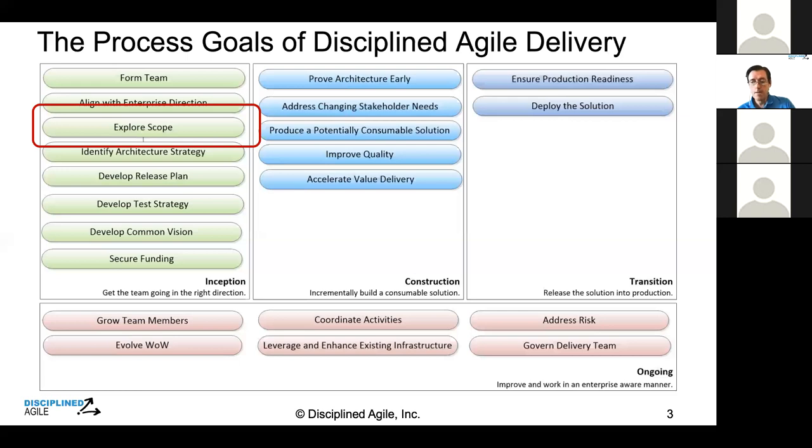Mark, can I jump in on this? Please do. Yeah, so I would just write it up as a simple story, and not really call it a tech debt story or whatever, but certainly not as formal as a user story, and along the lines of remove feature X because blah blah blah, because I want to see some sort of a reason. And then write it up on a card or put it in Jira, whatever your tool of choice is, and prioritize it and get to it just like you normally would.